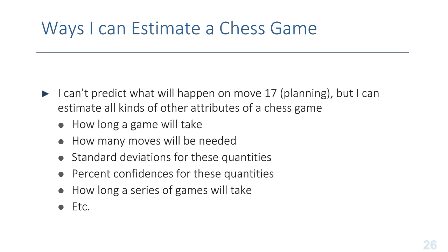So there are some interesting misconceptions here about the difference between estimation and planning, and about what we can do with a group of things versus an individual instance of things. In Agile estimation, one of the places this comes up is in the difference between, say, release planning and sprint planning. We are looking at more stories or more features when we're doing release planning, and given the historical data we have a greater ability to predict the release with accuracy than we do to predict the sprint with accuracy, just because we have a higher quantity of things showing up in the release than we do in the sprint. So given the higher numbers, we have a better ability to make that longer range, bigger estimate than we do to make the shorter range estimate.